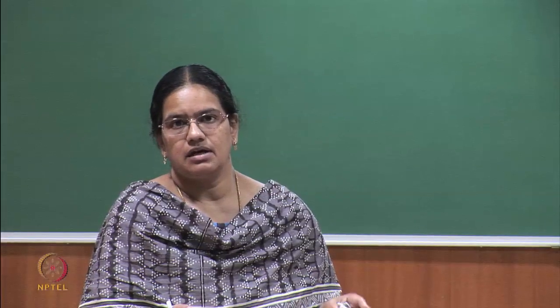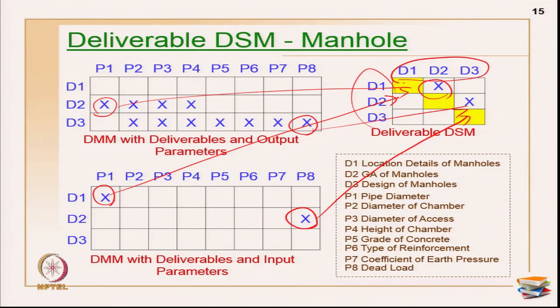The logic for formation, if you want to identify a complete DSM, is to go through decomposition. WBS will still hold good for you, and with the help of WBS you can identify all these levels. It can be level 1, level 2, whatever it is, assembly level, or you can go through team level, component level, or activity level. I have shown you several cases right now. You can stop at any level. WBS will help you to identify only this.